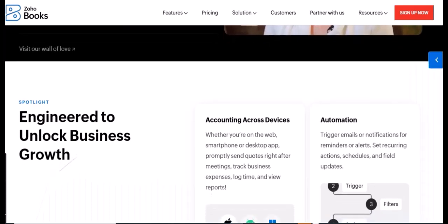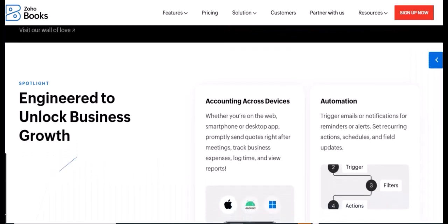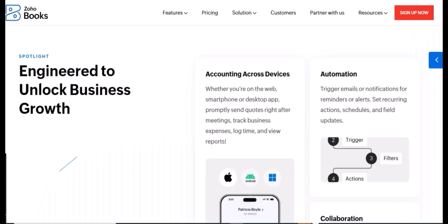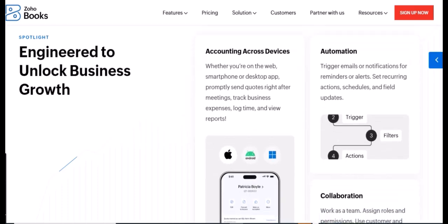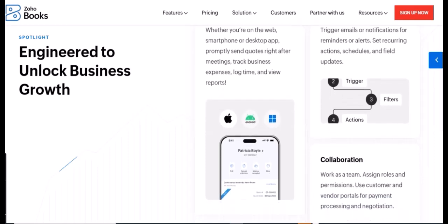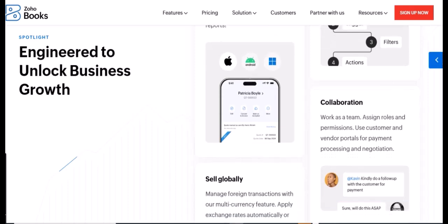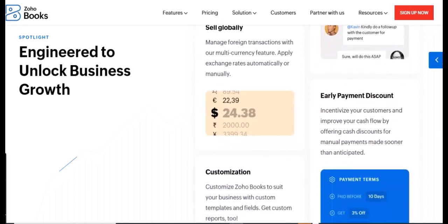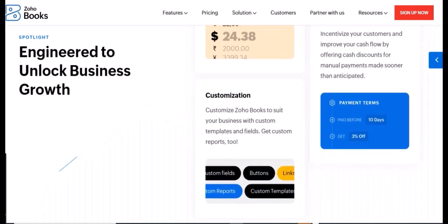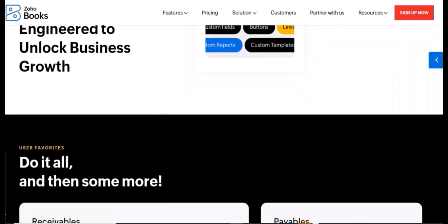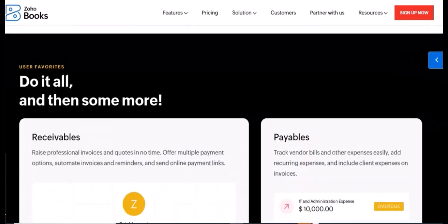Portals, your overall workspace, often representing your company or a major division. Projects, the main initiatives you undertake. Phases, major stages within a project. Task lists, groups of related tasks within a phase. Tasks and subtasks, individual work items that can be assigned, given due dates, and tracked. This detailed breakdown is crucial for any project, big or small.